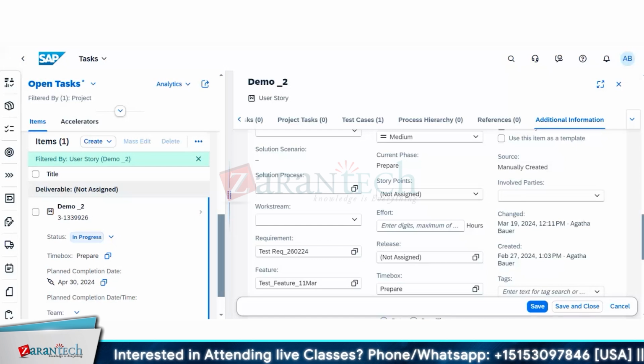But in all probability, you will have multiple test cases for testing one business process, because one business process will have multiple entities to it, right? So that also you have to decide. But test-related things could come a bit later, because during the realize phase, or at the start of the realize phase, you are going to onboard your testing team so that they can help with the testing. That can come later, but it still has to be decided.